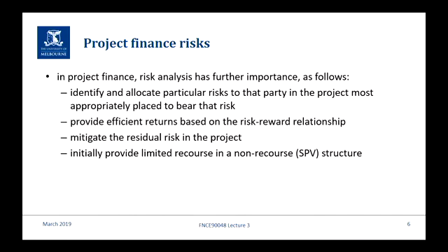So in project finance, risk analysis is important in all business, but in project finance, as I've said before, what we do is we specifically focus on risk allocation. So you identify and allocate particular risk to the party in the project most appropriately placed to bear that risk. Now it sounds a bit of a mouthful. It sounds fairly non-specific, a little bit intangible, but actually it's fairly tangible when you do the thinking. The construction company are the company that are best placed to bear construction risk. So in project finance, we transfer that risk to them under a construction contract. That's all I'm talking about there.